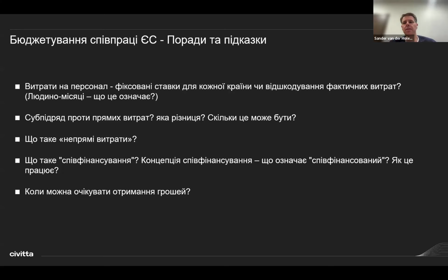So you need to keep in mind, how do you deal with that? Is there a possibility that you can staff more senior people on the project and say we need more senior people with a higher salary, because the actual money you'll get reimbursed is what you can actually declare. So in negotiations with other project partners, especially from Nordic or Western Europe, it is in your interest to negotiate a higher budget, and most organizations try to see if they can get more budget allocated, which is helpful for your own organization and your financial sustainability.